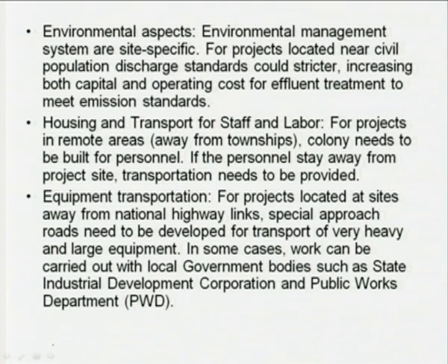Then the equipment transportation. If the project is located at a site away from national highway links, the project has to build a special approach road from national highway links, that will add to the cost of capital investment, especially if the equipment is very heavy and large, then such kinds of approach roads are very much essential. In some cases, work can be carried out with local government bodies such as the State Industrial Development Corporation or Public Works Department for building of the local approach roads.